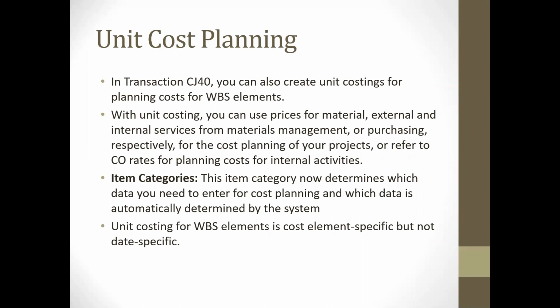I guess we haven't discussed internal cost planning, right? Let's say I have in-house resources, machines as well as persons, and if I maintain the rate of those machines or labor in KP26, then I can post actual cost at project level. We haven't discussed it, right? No. Okay, so we'll discuss.